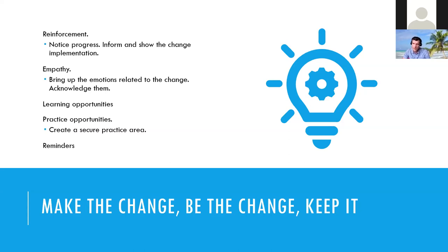And you need to be the one, from the project manager perspective or the accountable, or even just for leading Scrum Master ceremonies, because the review stage is also part of the flow of the ceremony. It's not only about finding out solutions, it's about making sure that they happen and then sharing the progress. So you need to have an article, meetings or ways to report the progress. If the progress is occurring, everybody is happy and they see that it's important to attend the retrospective meetings. But sometimes the work is really bad and it's boring and nobody would like to know about it.